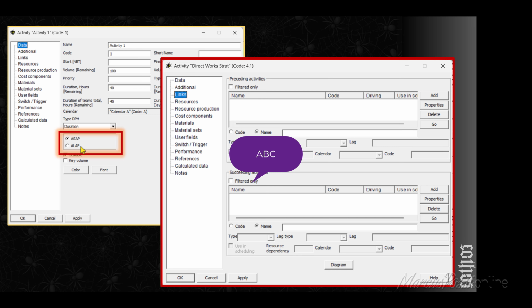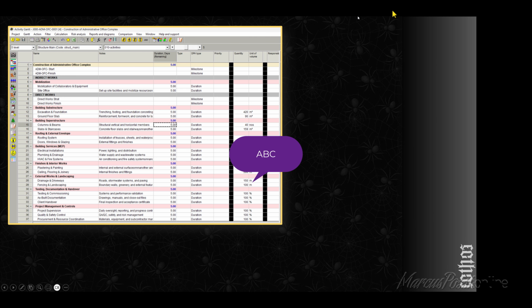So ducting works can commence at the beginning of a project, and then it can finish together with the project with the installation of the street light. So with that, I can say it can be as late as possible, to the end of the project. I don't need it early in the project to do anything. So it can finish together at the end of the project.